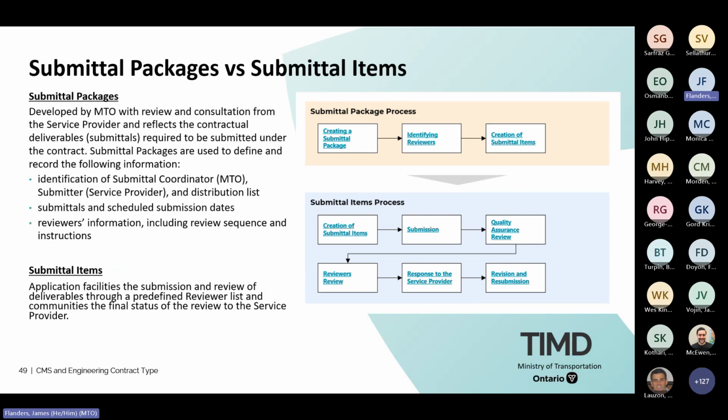Our reviewers are set up in the package so that anything that's submitted within that package goes to the same reviewers, instead of having to identify reviewers every time we do a submittal. It's just going to them specifically. And we will go through some examples of this when we get into the system demonstration.